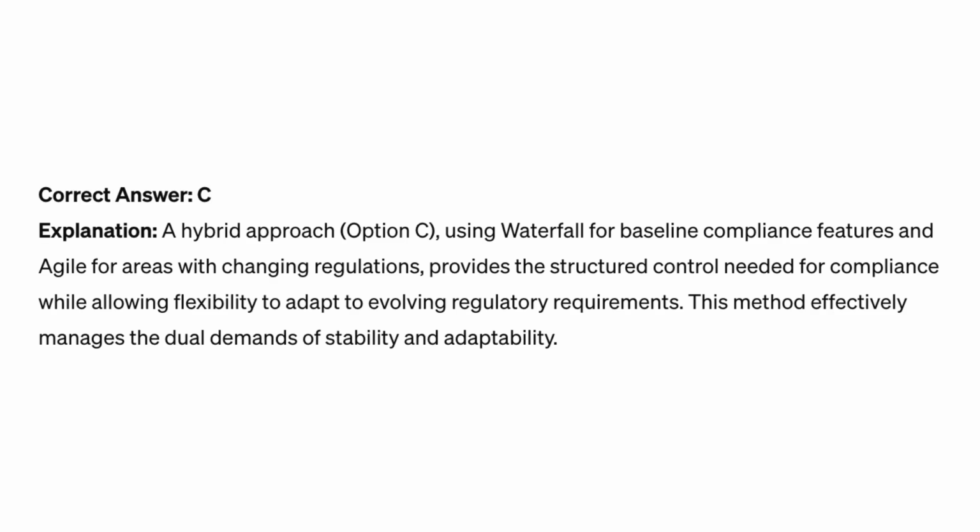Correct answer C. Explanation: a hybrid approach. Option C, using waterfall for baseline compliance features and agile for areas with changing regulations, provides the structured control needed for compliance while allowing flexibility to adapt to evolving regulatory requirements. This method effectively manages the dual demands of stability and adaptability.